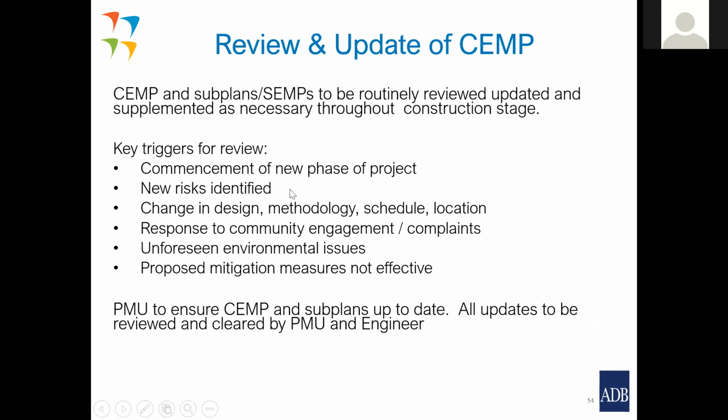So, review and update of the EMP. And again, we're still going. It's a moving document, a living document. The CEMP and the subplans need to be routinely reviewed and updated and supplemented as necessary throughout the construction stage. So even the CEMP itself isn't the final document. Situations change. You might have a cyclone come through. There might be a change of design. All sorts of different things can happen.